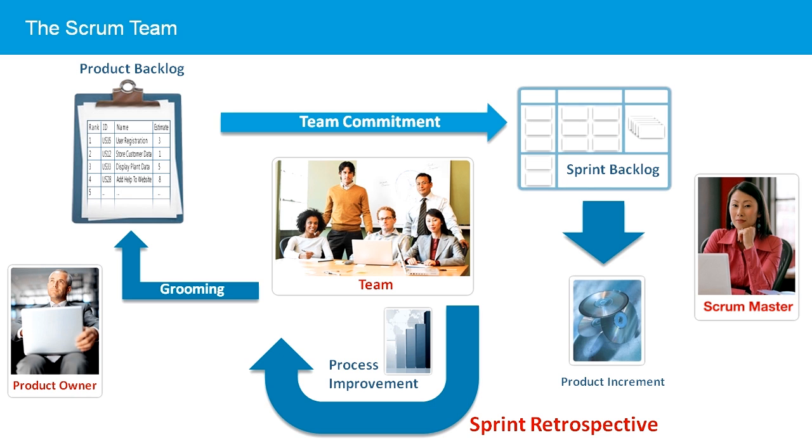Periodically, the team works with the product owner and Scrum Master to groom the product backlog. In the product backlog grooming meeting, a few of the top priority tasks on the product backlog are discussed. Once they are well understood, the team assigns a rough estimate of effort to each item. If the effort estimate will not fit into a single sprint, the item is split into multiple items that will deliver functionality that can be completed within a sprint.